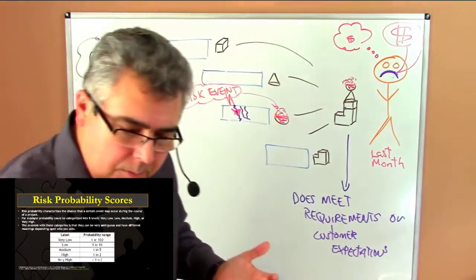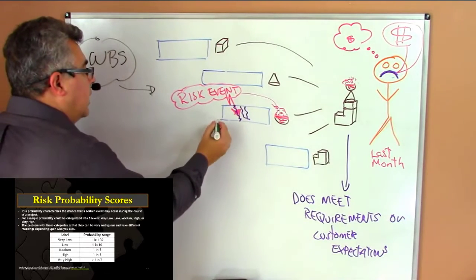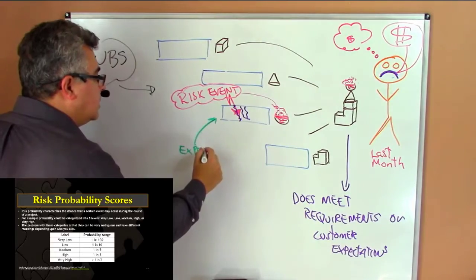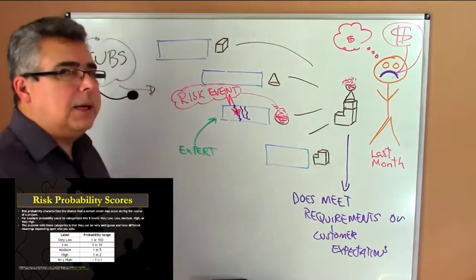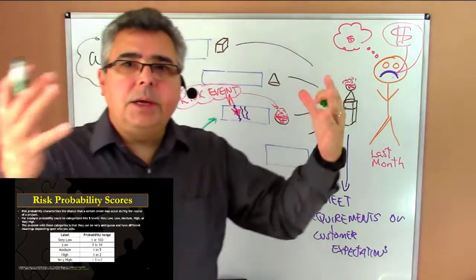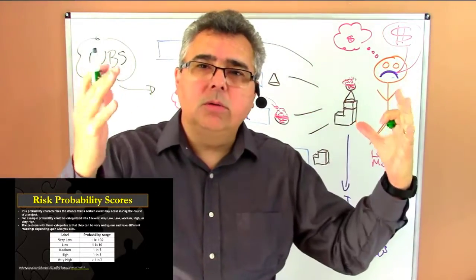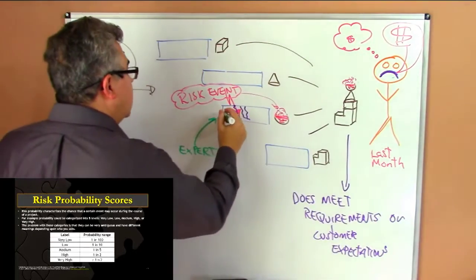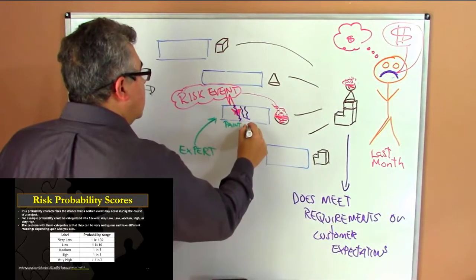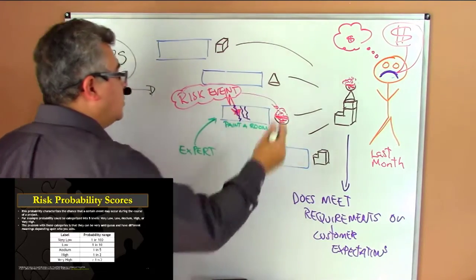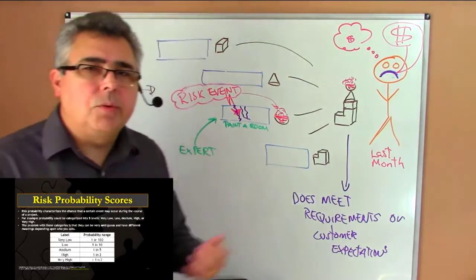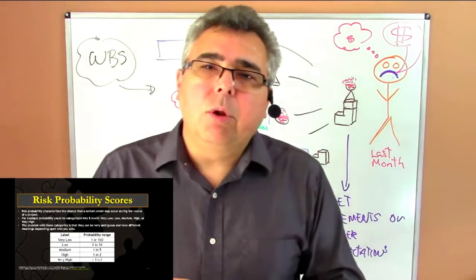So you can ask the expert on that task — someone that is an expert or has experience on the task. Let's say painting a classroom: we have four walls, and that is the task of painting a classroom. You go to the expert, probably a painter, and ask the painter what are the problems that you have faced in your life when you are painting a classroom.